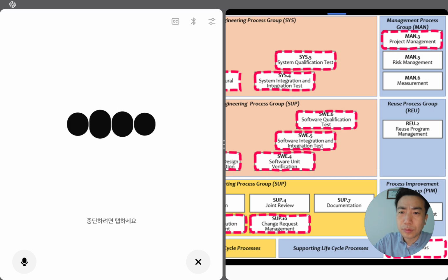Scope and tailoring approved and baselined. WBS plus milestone chart current, no red stale dates. RACI published and used. Risk register with trends and top 5 slide. KPI dashboard with at least 5 stable metrics. CCB cadence and minutes. Link defect trends, replan decisions. Lessons learned page started. Useful phrases for your meeting, natural, slow English.